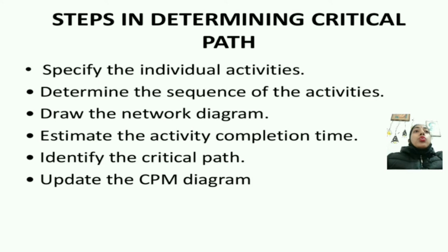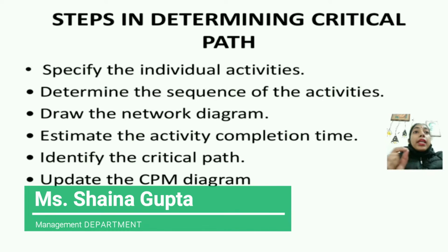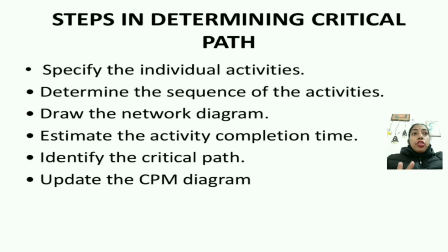We can use the work breakdown structure to identify the activities involved in the project. This is the main input of the critical path method. In activity specification, only the higher level activities are selected for the critical path method. When detailed activities are used, the critical path method may become too complex to manage and maintain.